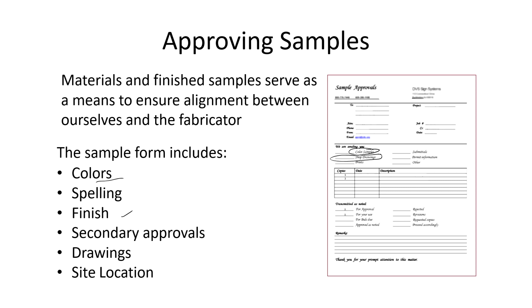This includes the spelling and finishes part as well. Then the paints, if it's been checked. Then any other submittals, that means any other coordination matters. Then permit information, if the government has any proposed permits or the landlord has proposed any important information or guidelines or any other.